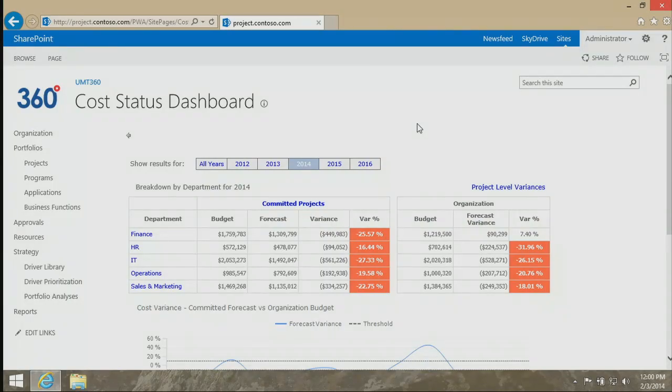and we'll maybe look at this towards the end. As a PMO, you can centrally administer the reporting process. Now, for 85 to 90% of our customers, that tends to be on a monthly cadence. So let's say the 5th day or 8th day of the month, you're reporting on what happened in the previous month. Does that sound like a process that you or your customers are adopting? We do see weekly occasionally, but it tends mainly to be monthly. So again, we'll look at that.